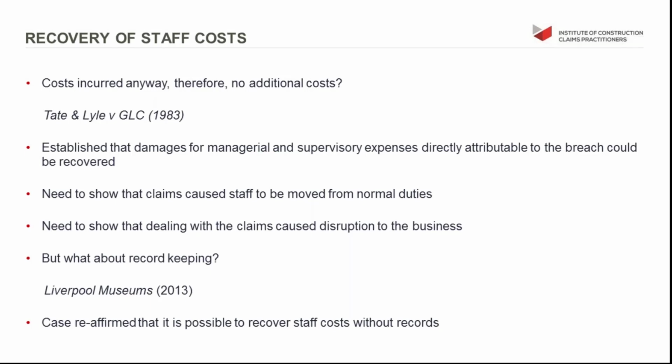Interestingly, in the Tate and Lyle case, the claim failed. Whilst the precedent and the principle was established, unfortunately, the record keeping wasn't good enough, and the claimant wasn't able to show that the staff had been moved from their normal duties, had carried out the claim preparation work, or that there was disruption.